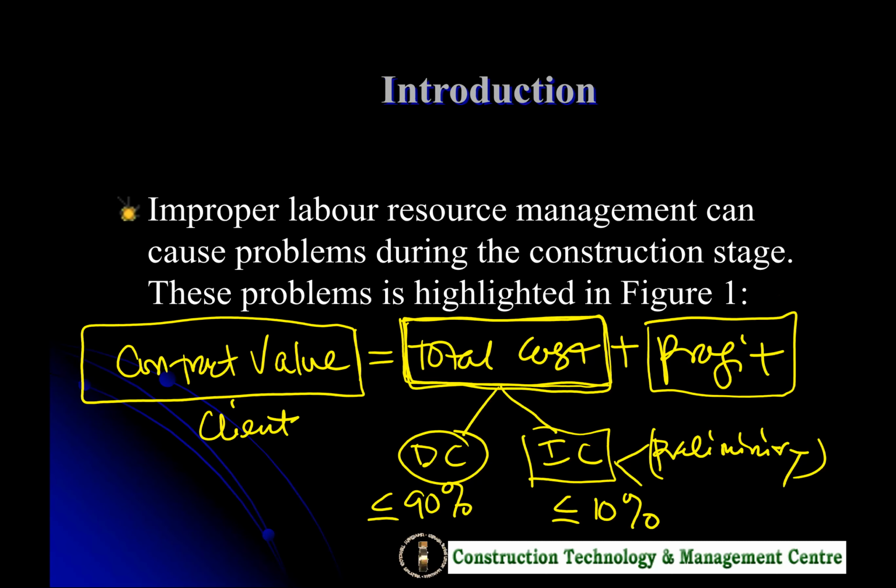Okay. How do we know the profit of the contractor? Well, simple. If you go to public listed company in Malaysia, we do have Kuala Lumpur Stock Exchange. So the company which is public listed on the bourse, basically they need to report their income and expenses, including all the tax and whatnot. And normally based on the reported company, the profit from contractor could be around 10%. This is what we call net profit after tax. See, after deducting all the things.